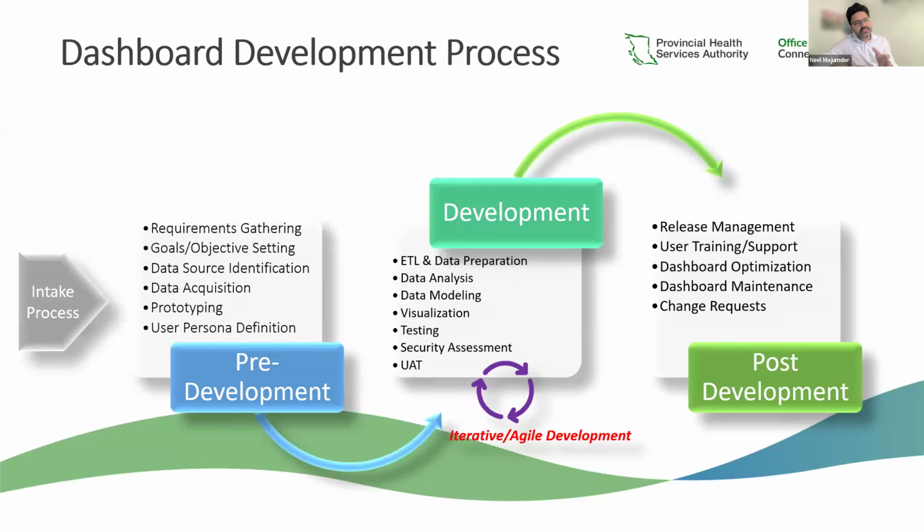Phase two is where the technical piece happens. We complete the process of ETL, and we bring over the data to the Microsoft Power BI platform. We spend time to model the data, and then, based on the metrics of the KPIs, we create some visualizations. After that, there is testing and also user acceptance testing at the end. And of course, this all goes through a privacy review as well. This is where we really create the dashboard and the data visualizations based on the needs assessment that we did in phase one.